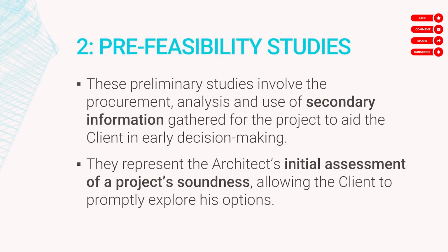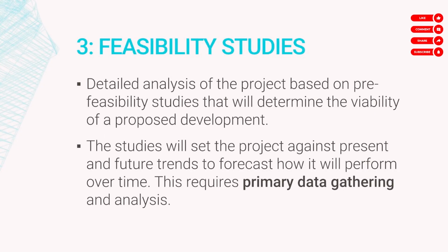Now, the third pre-design service is the feasibility study service. So feasibility study is the detailed analysis of the project based on the pre-feasibility studies. Ang goal ng feasibility study is to determine the viability of the development. So this is much more detailed, much more technical, and much more parang sure. It will set the project against present trends and future trends. The feasibility study must forecast how the project will perform over time, the return of investment, etc. And a study like this requires primary data gathering.